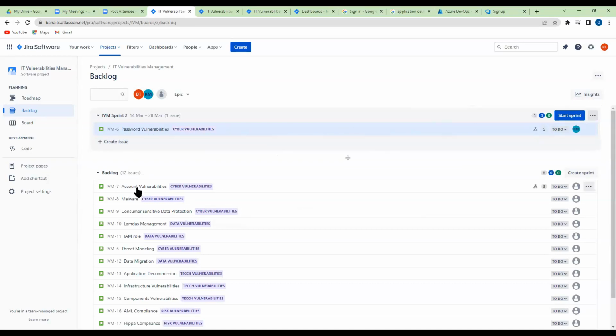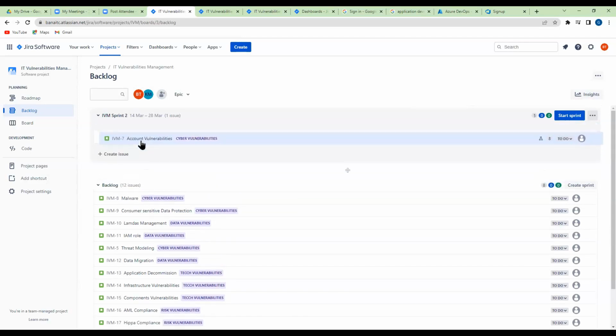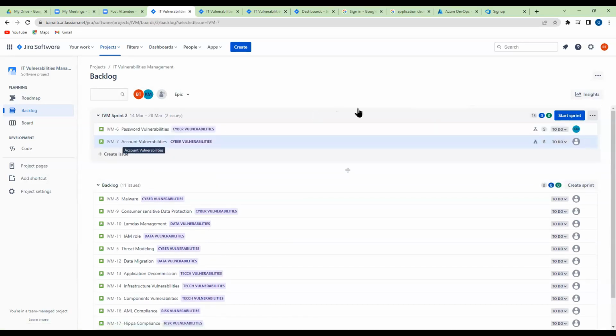And then that's how you can also move it from down to up. And remember, when you move it and it's estimated, it keeps counting automatically. That is what Jira has, and Azure DevOps doesn't have this feature. You have to count it yourself, which is really old-fashioned for me. But Jira gives you the opportunity to count that automatically. So if your velocity is 13, you've already reached your velocity, you stop. And then you just click on start sprint.